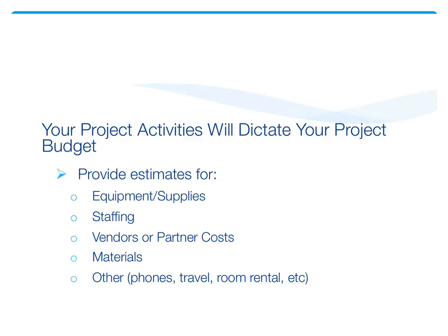And if you don't know what in-kind is, generally somebody is donating something to the project, and they're not charging you for it. Or they might be charging you less, and you can call that discounted amount in-kind. In-kind is really important on grant applications because that can actually reduce your cost match. So basically, that is the budget piece of it. You need to think in terms of your activities and then your budget. So your activities lead to your budget.